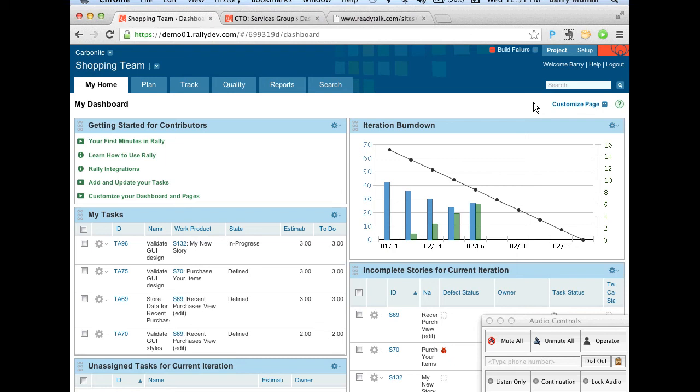Yeah, that's production. And so, one thing I've been discussing with some of my colleagues is that we came from the agile planning background, this Dean Leffingwell model, where as an organization you plan releases, with the goal to do mid-range planning, the planning for the next quarter is very typical, or maybe 2 months.